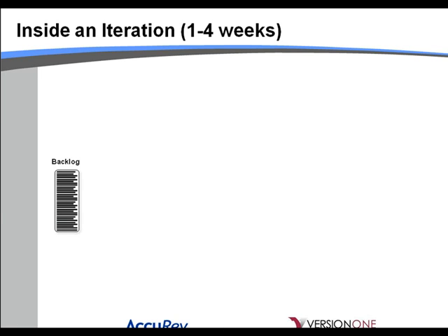This is a list of everything that anybody has ever asked for. Now you may bucket it into 2 buckets: the stuff that has a chance of actually shipping in the next year, and everything else, maybe from a strategic perspective or what have you. Or maybe you start a new backlog. Everything that anybody might want, including defects, any work that anybody's going to actually do to deliver value to a customer is going to go into that backlog. Mostly it's going to be composed of stories, but you may have some defects in there as well.